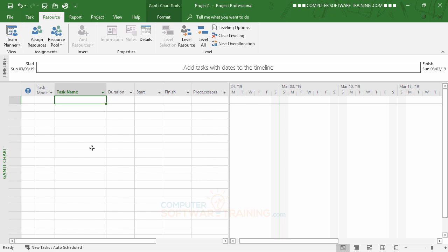In other words, if you were to think about your project as a whole, can you break it down into groups of tasks that you're going to have to take care of? It'd be almost like if you're building a house. You've got different phases. You've got putting in the foundation after you've done the excavation, so excavating and doing the foundation might be one phase. And then putting in the framing for the house might be your second phase and so forth.